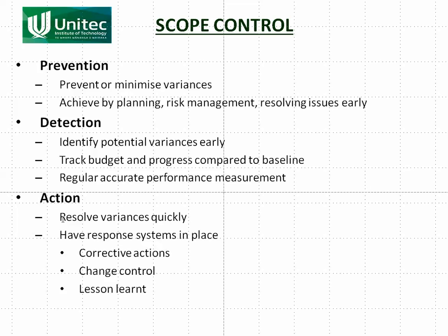When a variance happens, you need to resolve it quickly. You need to go to the client immediately. You need to get their agreement on the extra budget, on the extra time. You need to have systems in place where if something happens, you know who to talk to to get the budget increased or to get the time increased. And you also need to be recording the lessons learned. What did we learn from this change? Next time, we're going to include that piece of work in our program, so our program will be more accurate next time.